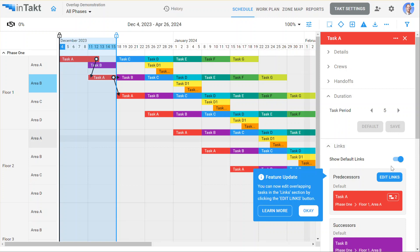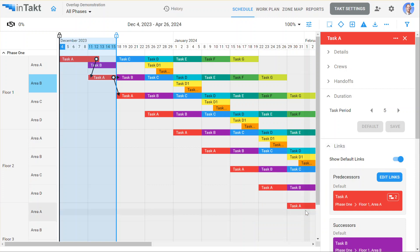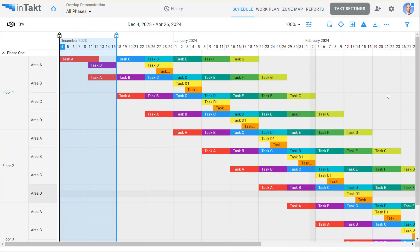So far as it's finished to starts with a positive lag or start to starts with positive lags. It avoids negative lags. It avoids loose ends. It sews everything up neat and clean for your CPM tool when you export it. And the sky's the limit. You can do that with any task in any situation. Create those overlaps now.